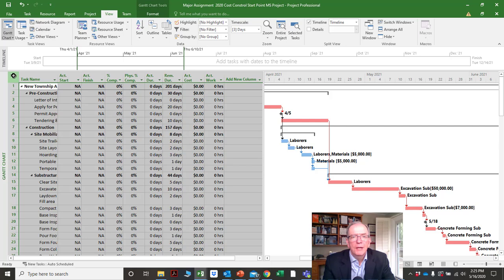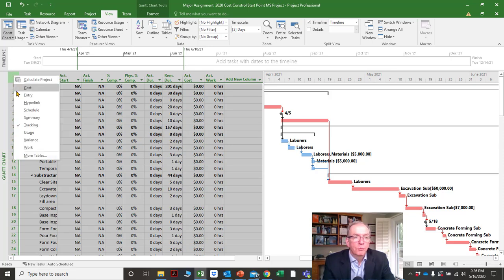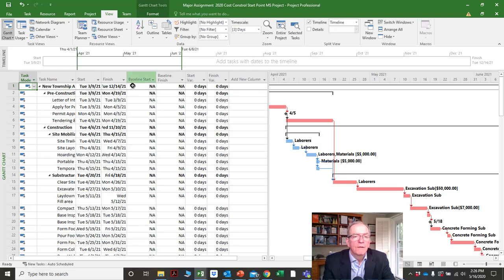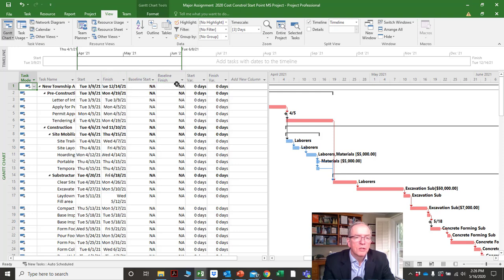It's a very important screen and one of the main functions of using scheduling software, because the only reason we develop a plan is so we can compare what's actually happening to what we planned and see the variances.